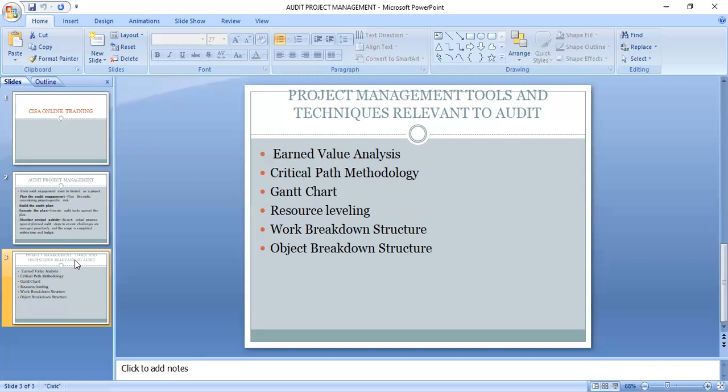If we say we are going to finish audit planning by February 15, and by February 7 we are still battling with it, then the project manager can start asking questions. So the Gantt chart is very important in project time management.